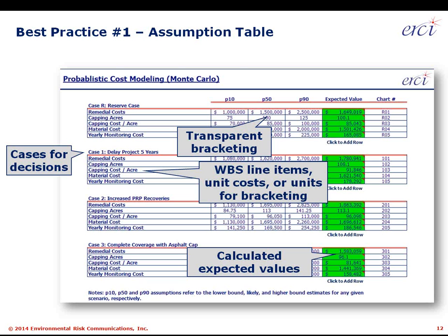So we again pull the assumptions off of different worksheets, centralize them on a single worksheet so that we're able to compare them. Next columns over, we use the P10, P50, P90 to bracket each of those assumptions. Those are developed through a Delphi or Socratic process typically. Basically question and answer, talk through if the project team believes that those are likely in 1 out of 10, 9 out of 10 circumstances like the site. So we test for that, we ask for that, we probe for that,